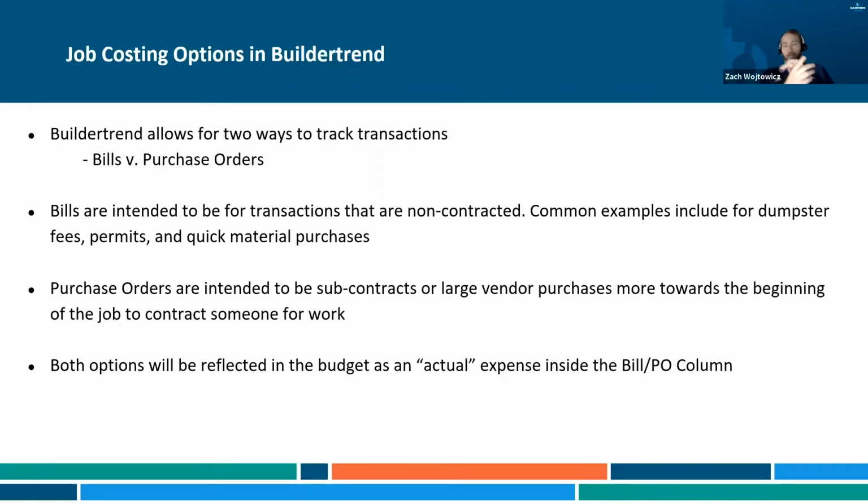That's important. And even if you're not using Buildertrend's estimating tool to derive your budget, if you can get it into Buildertrend in some shape or form, which means you're going to adapt your estimate to use the same cost codes and have a tool to put into the system, that still is going to give you a lot of information and make things a lot easier. So I've had a lot of conversations like, hey, we just need to find a way, one way to lay out the baseline of here's the numbers that we're trying to stick to.